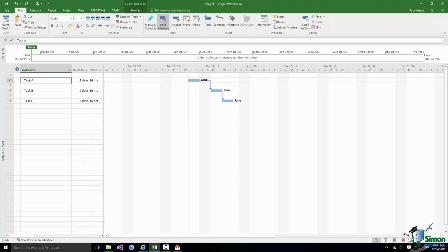Now let's suppose that I provide Jane with some help. I say, Jane, John is going to help you. If I assign John to task A, what do you think would happen? Now what may happen is you may look at it and say, well, obviously Jane's going to be able to get that job done in half the time. So instead of being a 2-day task, it's going to be a 1-day task. And obviously that is one option.